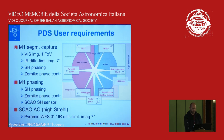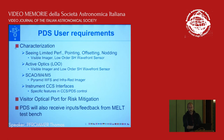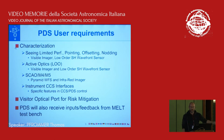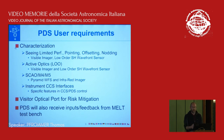The order might change how we do things on the mountain, but for the characterization of the telescope, the seeing-limited performance has to be characterized: pointing, offset, nodding. With the several tools we have available, we are fairly certain we can verify and characterize the telescope. The fourth point is the instrument CCS interface. The PDS uses the exact same interface as all instruments, so we will test this interface. We will only communicate to M4 and let the telescope do the rest with offloading, always ensuring enough actuator space available on M4.